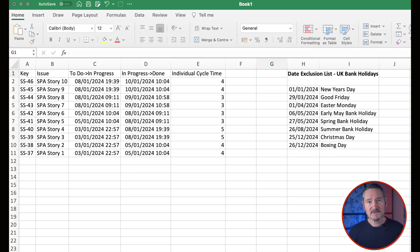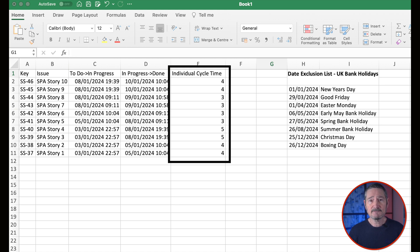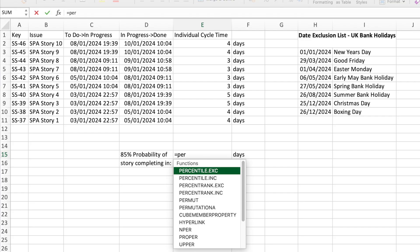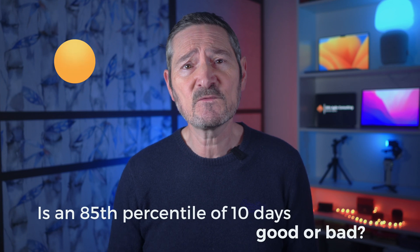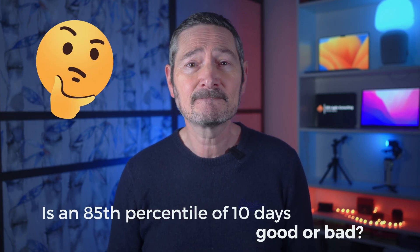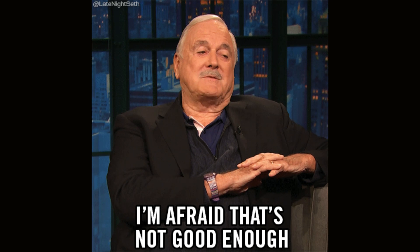Simply copy that formula all the way down your list. This shows you your cycle time for every individual completed story, and this is great information — but we can go one step further. You could take an average of all completed story cycle times, but averages are notoriously bad. Check out the book by Sam Savage, 'The Flaw of Averages', to find out why. Instead, what we want to do is find out the high probability of completing any of our stories. So we take the 85th percentile of all our previously completed stories using Excel's percentile function. The data here is looking pretty good, but this is just from my home simulation — I would expect your data to look very different. If your 85th percentile is telling you it took 10 days to complete any of your stories with an 85% chance of happening, is that good or bad? Well, if you're doing Scrum and two-week sprints, this is telling you that you'd need to start all your stories pretty much as soon as you start the sprint to have a high probability of completing them — which isn't great.